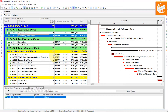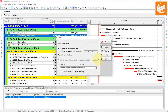First of all, we will schedule that project. Schedule it by pressing F9 or by clicking on this schedule button.